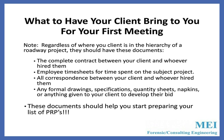What to have your client bring to you for your first meeting: regardless of where they are in the hierarchy, ask for: the complete contract between your client and whoever hired them; employee timesheets for time spent on the subject project; all correspondence between your client and whoever hired them; any formal drawings, specifications, quantity sheets, napkins — yes, I've seen contracts written on napkins — or anything given to your client to develop their bid. From these documents, you will prepare your list of potential responsible parties.